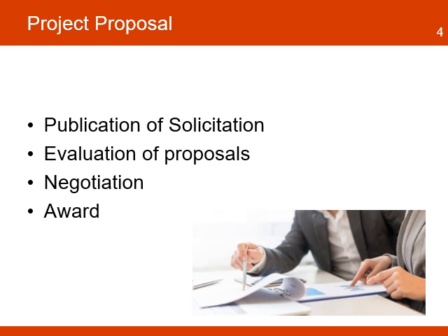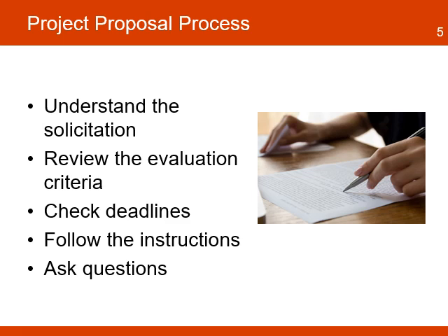The steps of this process usually include the following: the publication of the solicitation with specific instructions to submit the proposal, including due dates; evaluation of the proposals, which includes the experience, capability, economic, and technical approach of the proposal; the negotiation of the proposal, including contractual terms; and finally, the notification of the award to the selected organization. A competitive process that requires careful planning.